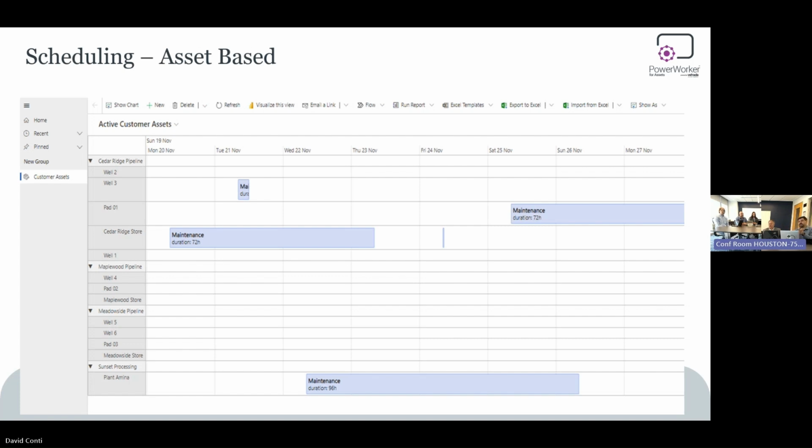What I can also see in here is other pipelines. That allows me to know that across my 3 pipelines, I can achieve a throughput of 110 and my processing plant can take a throughput of 90. Generally, we're not running at full capacity across my 3 pipelines. So if I take one of them out, maybe I can still produce 90 per day. But if I'm only contracted at the moment for 55, maybe I can be performing more maintenance right now while I have a lower demand that I'm trying to supply for.